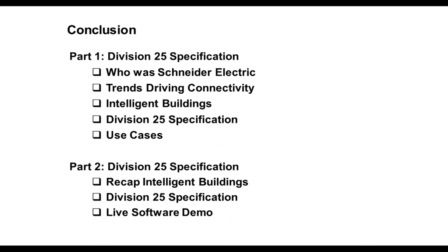Okay, great question. Yes, we get asked that question a lot. So in working with technology to connect different subsystems, different divisions together, we get asked, well, how do I procure that? How do I go to market with that? Division 25 was really intended to be a division that would be procured through a general contractor or directly through some type of construction manager. The idea is that it would be coordinated through that type of entity on a project.